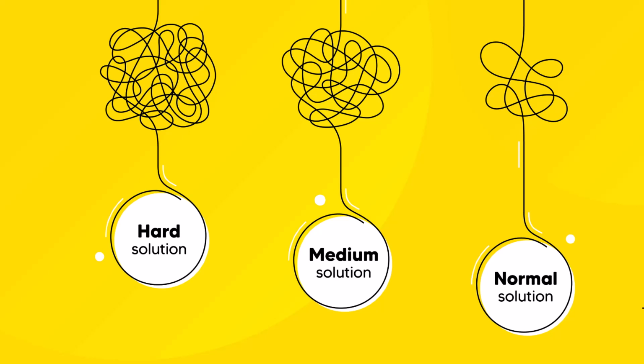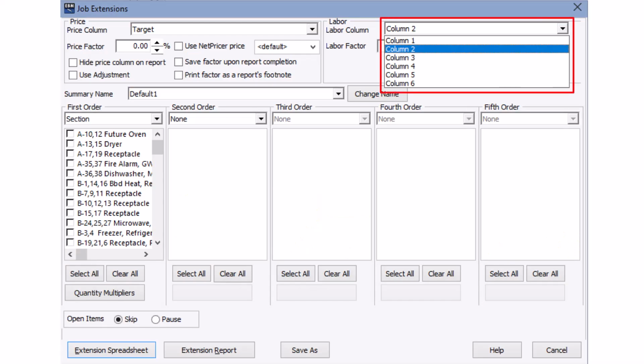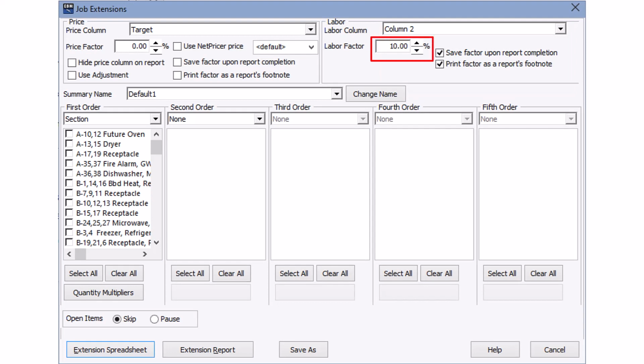The NECA Manual of Labor Units provides 3 levels of difficulty, including normal, difficult, and very difficult. Each level graduating from normal to very difficult adds more installation time for each type of material. With commercial estimating software, you can also adjust between each level of difficulty by percentages.